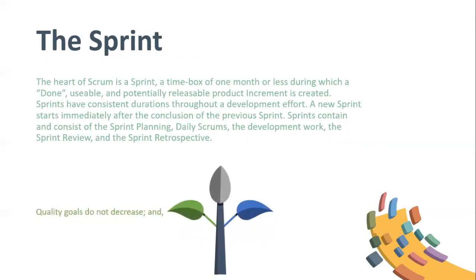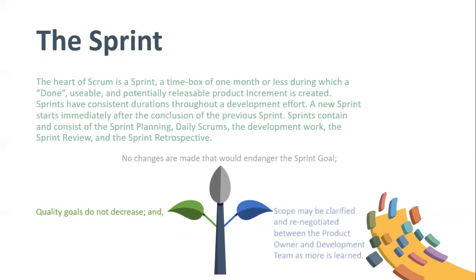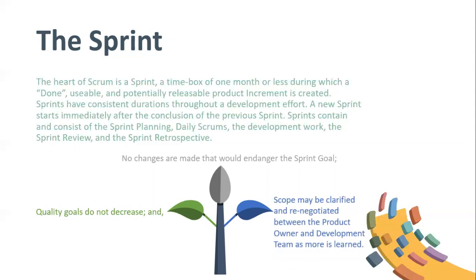Quality goals do not decrease. No changes are made that would endanger the sprint goal. Scope may be clarified and renegotiated between the product owner and development team as more is learned.